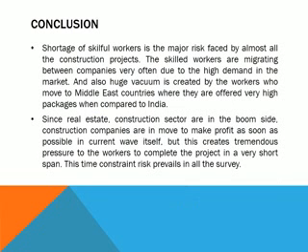Conclusions. Shortage of skillful workers is the major risk faced by almost all the construction projects. The skilled workers are migrating between companies very often due to the high demand in the market. And also, a huge vacuum is created by the workers who move to Middle East countries where they are offered very high packages when compared to India.